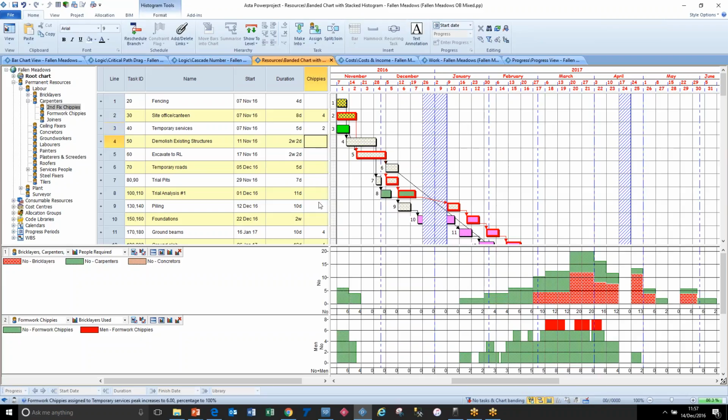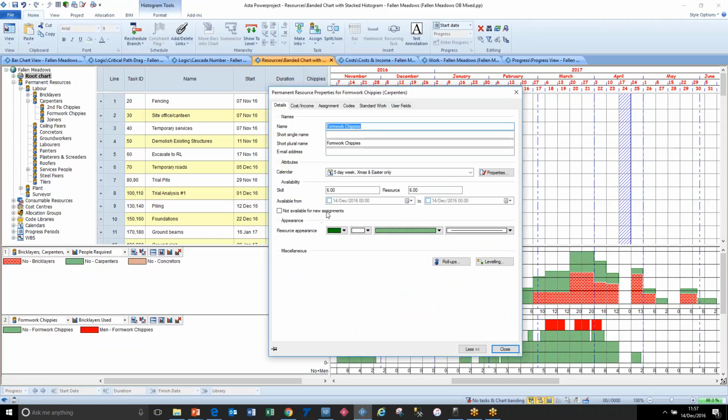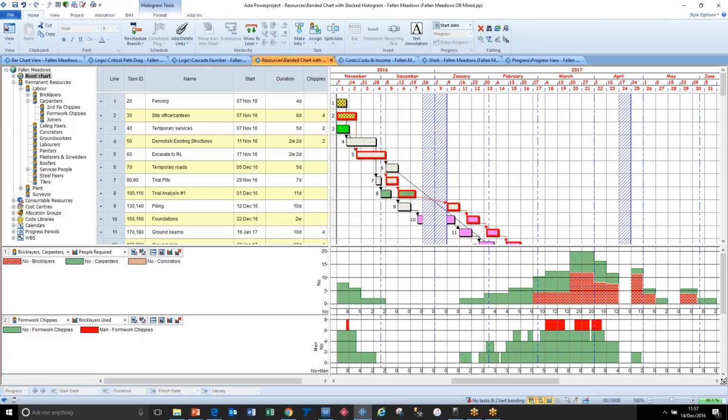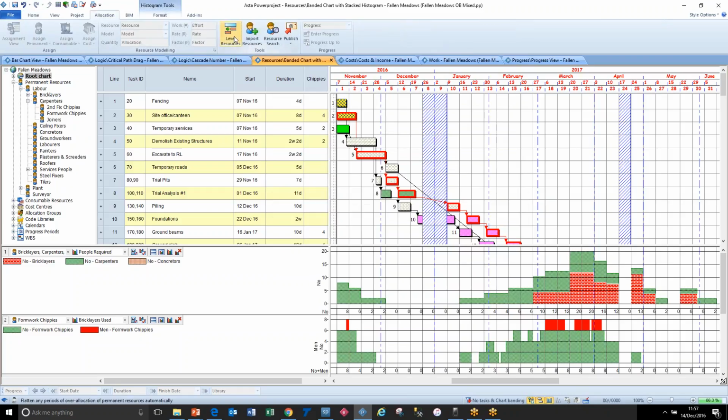And for services we need a couple, and for demolishing existing structures we also needed a couple of those. So at some point there I've got a warning down here, I've been over allocated, and that's because I've used 8 people, and I've only said in the library that I've got 6 people available. So if that was true, I can reschedule the program with resource leveling, so we can squash down that over usage, and it potentially delays the project depending if there's any float on those activities.